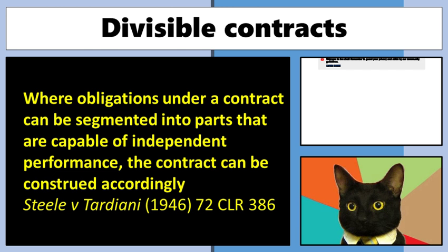What's the court likely to do? They're likely to chop that up into essentially 5 different contractual obligations. The first 3 are done. They've been discharged by performance. The other side did what they said they're going to do. We're only going to analyze the other 2. The one that's been partially done, and one that hasn't been done at all. Because that's pretty obvious that no performances occurred, and that makes the analysis from a contract law perspective pretty easy.